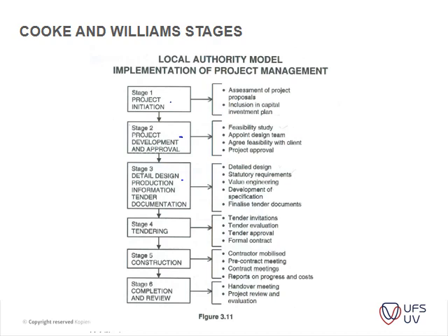See here we've split our tender documentation, actually goes into stage 4, where the architect actually has a stage 4.1 and a stage 4.2, where 4.1 is the documentation that goes to the local authorities, and then 4.2 is the tender documentation. So within South Africa, this last section of stage 3 from the UK actually falls in stage 4 already.